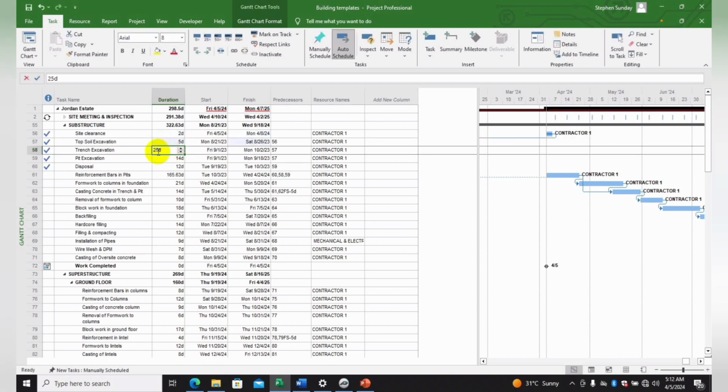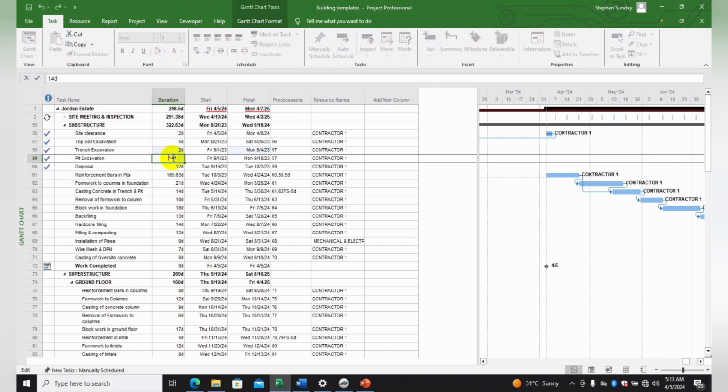So we're assuming that we are coming at this work with a lot of manpower. Since we might be using an excavator, but for this we might not be using the excavator, depending. Everything relies on what you have down there. So if we're using an excavator, 2 days. Basically, this is exactly what you have to do when you're allocating the days.